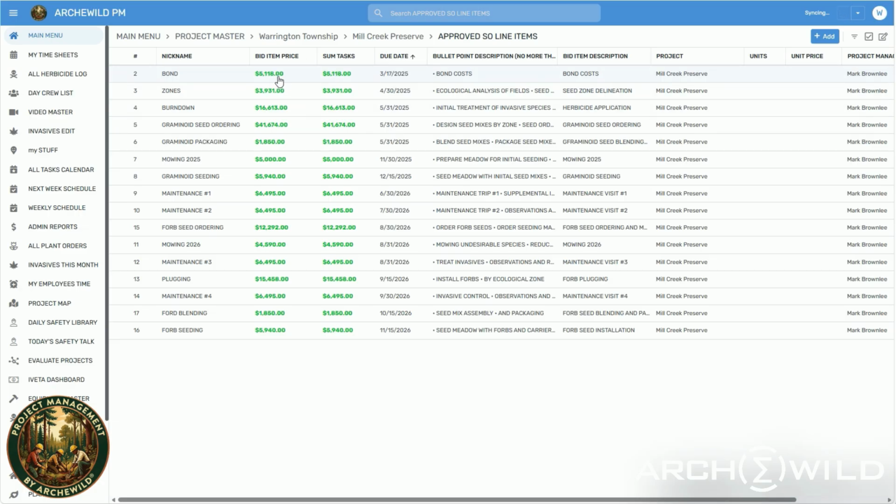So that project was decomposed into these 16 bits. The one meaningful consideration for how to invent the sales order line items is to spread out the work over time and the invoicing events over time. It is the words on the sales order that govern invoicing. So customers care just a tremendous amount about what appears in the schedule because it is the contract.